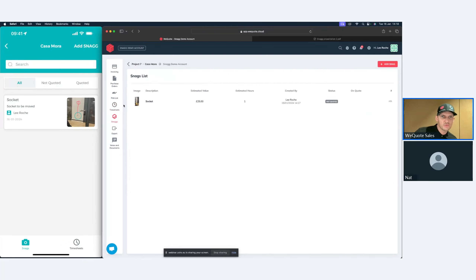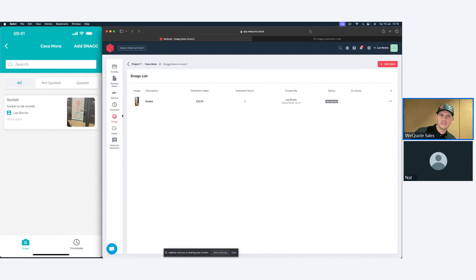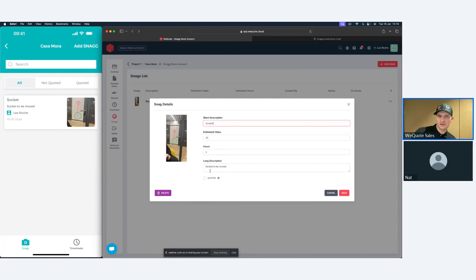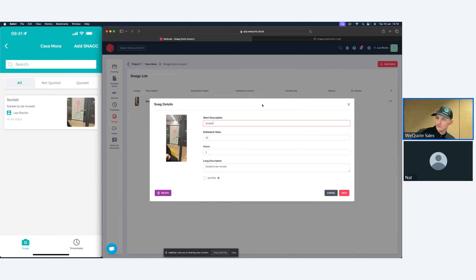These snags pull straight back into WeQuote pretty much instantly — the API is not polled, it's instantaneous. If you have an internet connection all issues and snags pull through straight away. They sit in the snag list until you deal with them. You can load them into a quote — it could be a change order — and push that through to an invoice. You can also sign them off, and there's a tab showing whether they've been quoted or not.